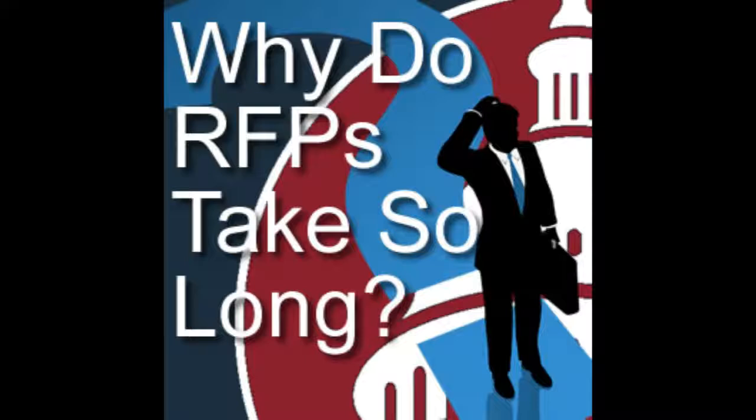Well, not everybody can make that, right? And not everybody knows the computer programming behind it and can update all these systems and make sure they're working, et cetera, et cetera. That's a complex requirement. So imagine how many different layers of engineers, of software developers, of users, of all kinds of different people who need to understand what's their take on this requirement. And then, okay, how are we going to compete it? Well, your instinct probably is that's not something I want a small business managing. So now you've got a limited number of companies. You need to talk to those companies, figure out how long it's going to take them to build it. How much is this going to cost? And this is a developmental project. So when you hear the term developmental, think in terms of long and expensive.